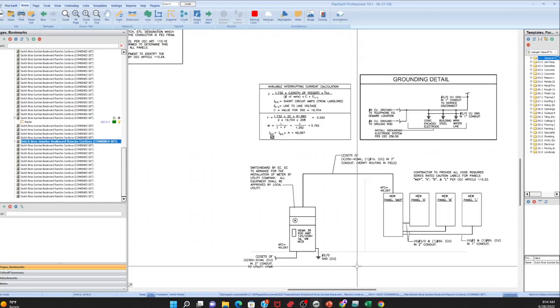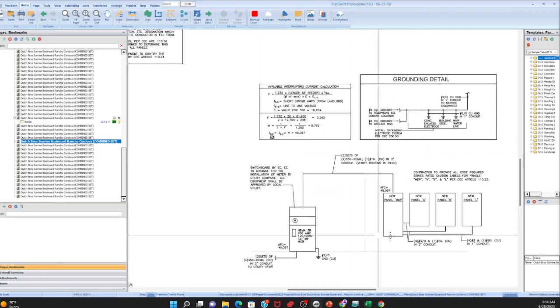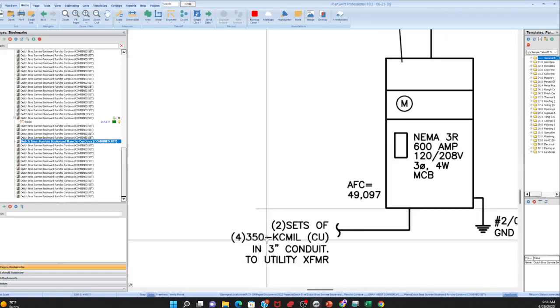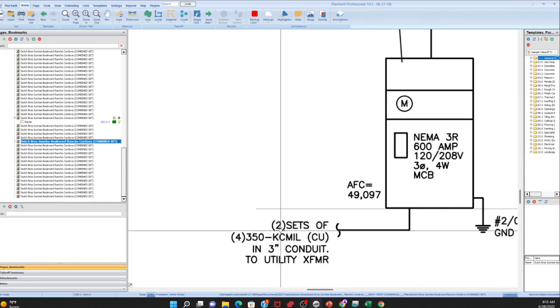But you said to imagine it's right there. Well, if it is right there, we've already done the measurement, which accounts for this right here. So that's 132 feet to the disconnect switch. Okay, and then you say what? So 132 feet times 4. Oh, times 8, right? Because you have two sets. So don't forget that because you have two sets, it was 132 feet, it's really 260 feet, right? Because you have two sets.